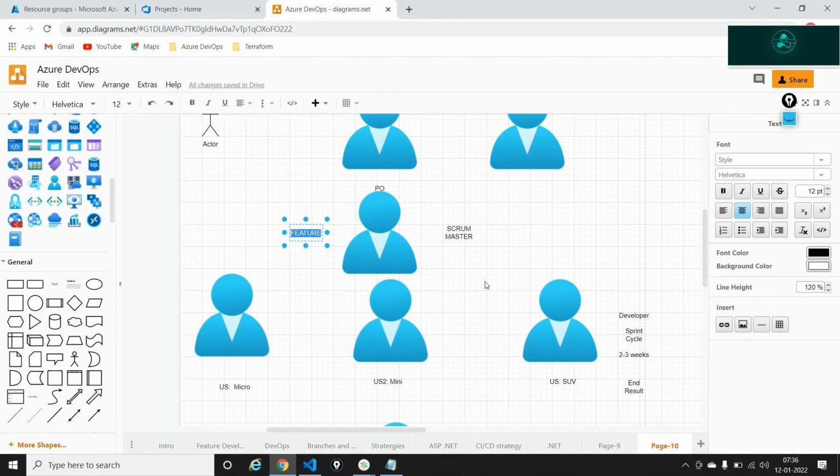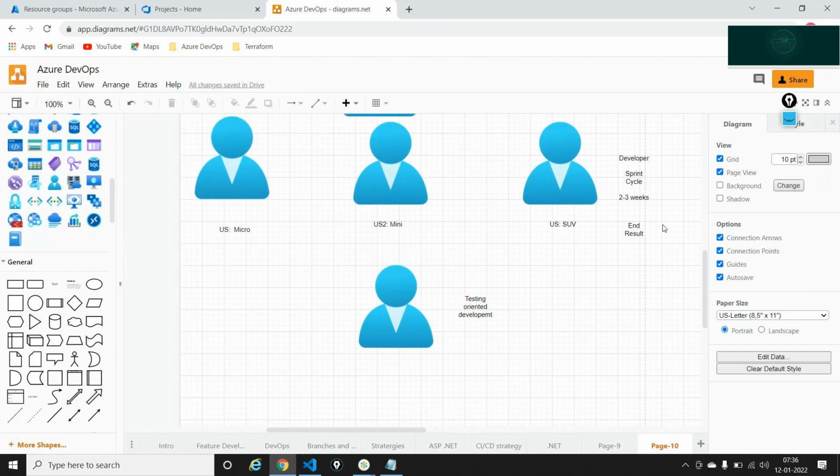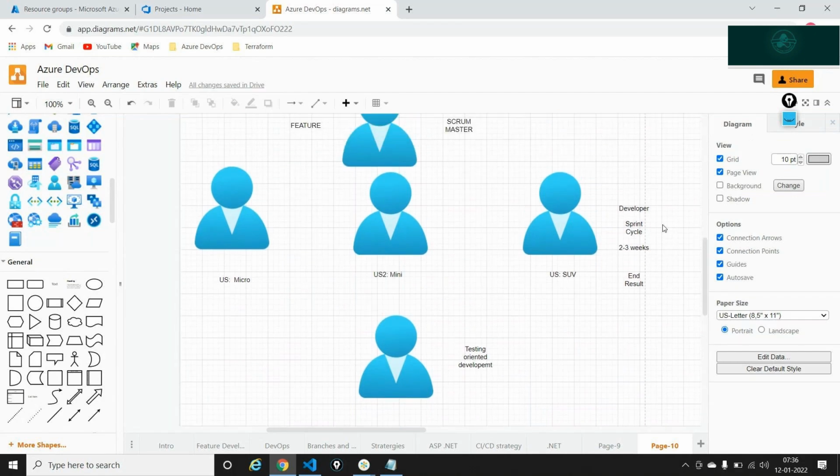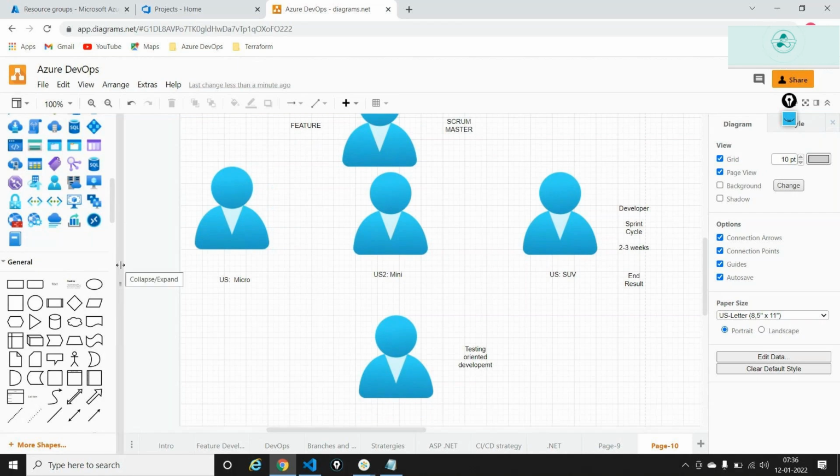I'm dividing those 8 weeks into 6 weeks of development and 2 weeks of testing. So it is 2 sprint cycles for development. Considering the sprint cycle is 3 weeks, it is 2 sprint cycles for development and 1 sprint cycle for testing the application. Together, that is about 2.5 or 3 sprint cycles.